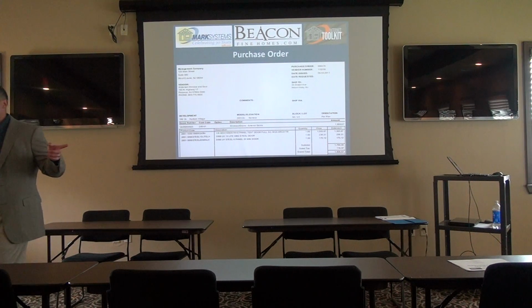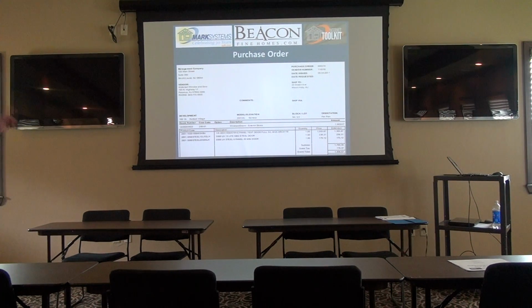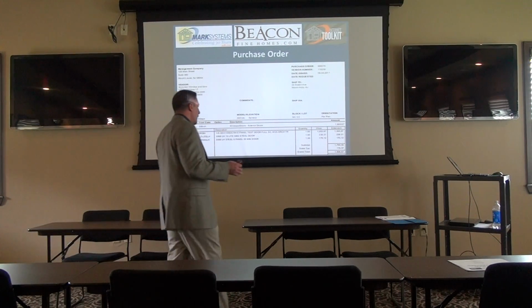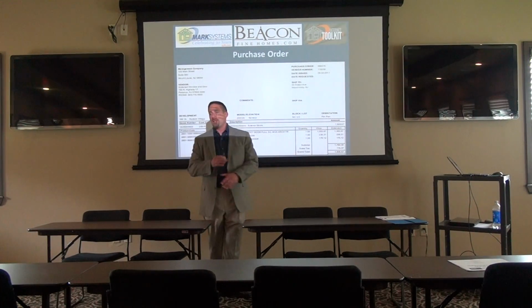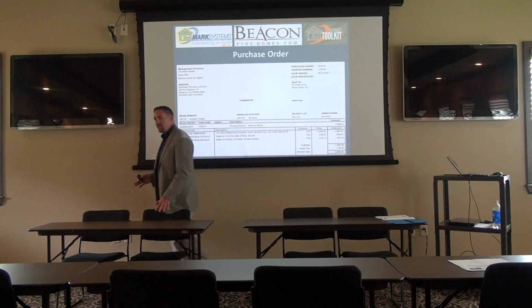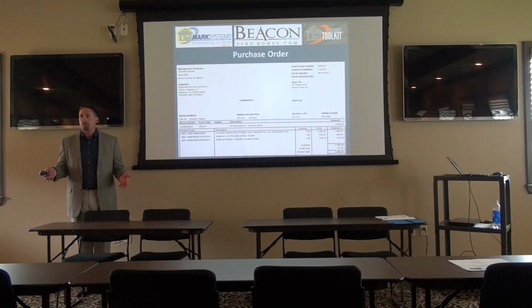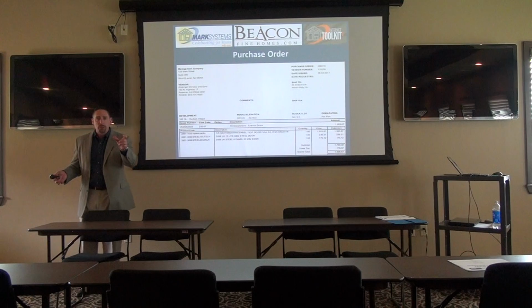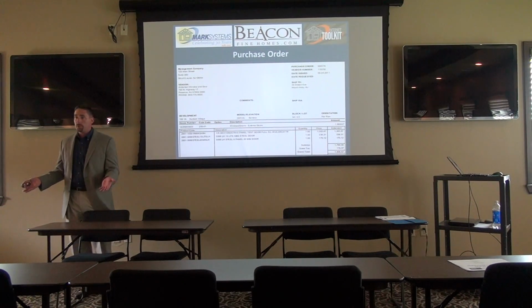That generate the purchase orders, generate this document here. Notice the purchase order looks just like the work order. Work orders and purchase orders do effectively the exact same thing. The only difference is, if you're a material supplier, you don't want to see plumbing fixtures. You want to know what material you have to supply.